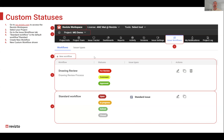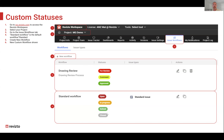If clients are on 5.13 or earlier, they won't see the custom statuses. What they will see is a link between the old statuses and the new. You can see the standard workflow with open, in progress, solved — and an example of a custom status workflow called drawing review, with statuses: for review, comment, and approve.